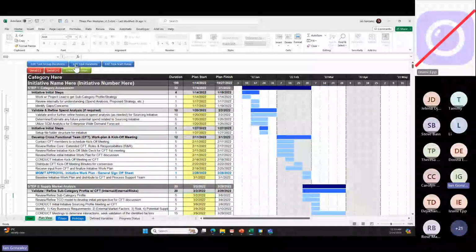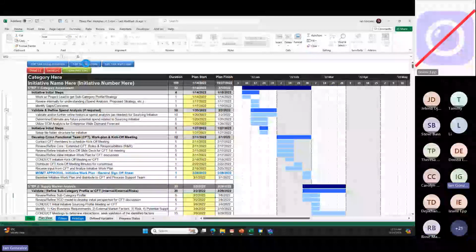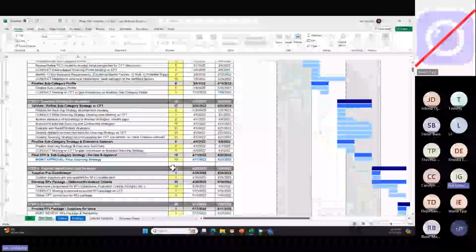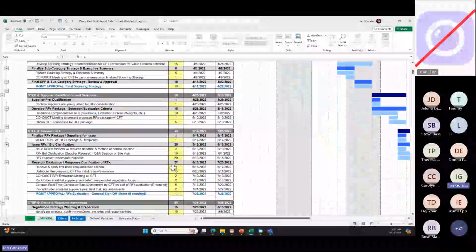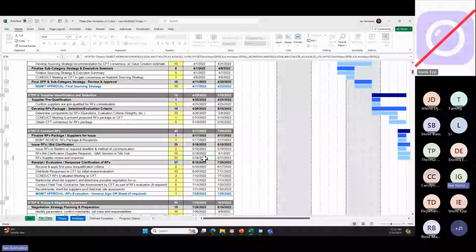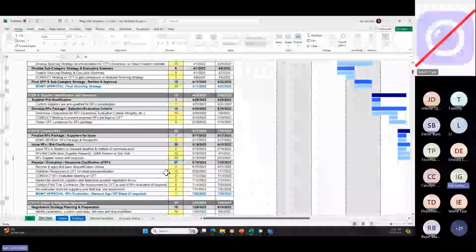How to do that? So edit task durations. If I click that button, it'll take my existing plan and go into another mode where this now becomes yellow. So let's look for something that's long over here. Long tasks here, 20 days to the bidding process. That will be May 18 to June 15. Let's say I know my suppliers can only do it in 10 days instead of 20 days.